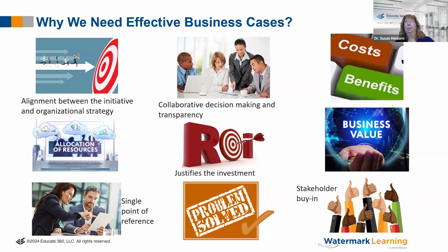Whenever I do business cases, what I would do is actually start planting seeds. And what do I mean by that? I would test out my business case. So I would go to the people that needed to sign off, or the managers, the people impacted, and I'd say, hey, I'm thinking about this. Here's some of the parts of the business case I have done. What do you think?